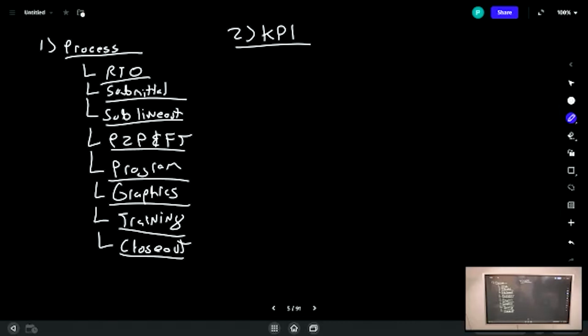If your team simply cannot execute because they are inept and don't know what they're doing, that is not a reason to re-estimate projects. The purpose of re-estimating is you review the project and you realize that the salesperson missed something or did something wrong, and then you re-estimate it to accurately represent that.